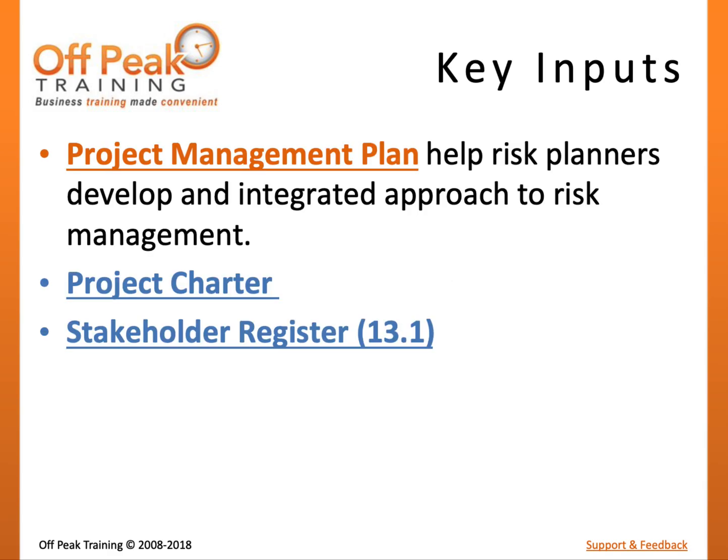There are three key inputs to the plan risk management process. Since risk management must be well integrated with other aspects of project management, the project management plan is an input, as it will help to provide insight as to how other aspects of the project will be managed. Important components include the scope baseline, which represents the approved plan of work, and subsidiary plans such as the schedule, cost, and change management plans, which will also strongly influence risk management.